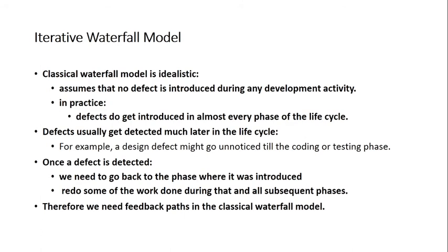Whatever correction you have made should be made in the subsequent design also, and subsequently it must be done in the coding phase also. It's not that you only corrected the requirement and then testing, leaving the designing and the coding part. No, it must be in a sequence. If you're working on some part and making any changes, it must be reflected in each and every phase. It must be in sync with each other.